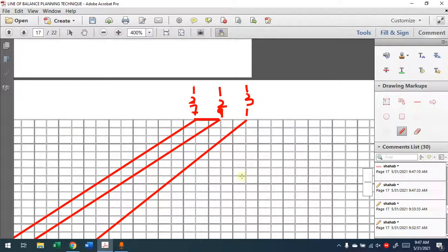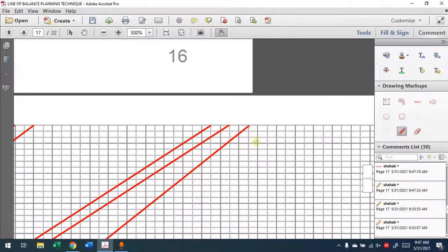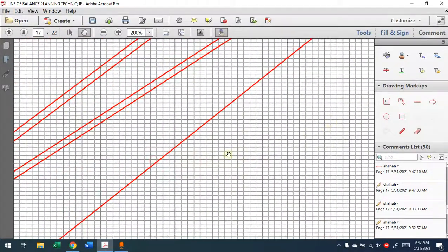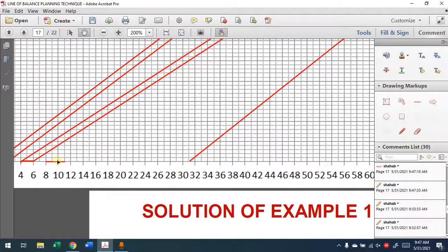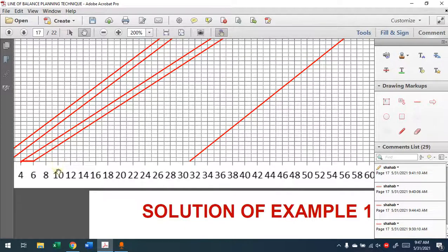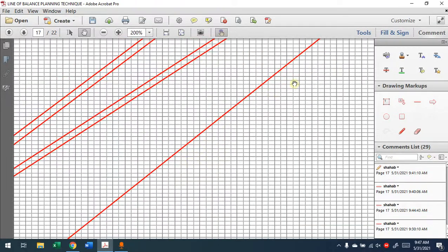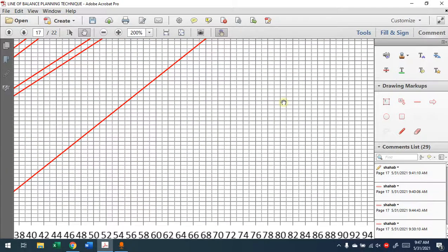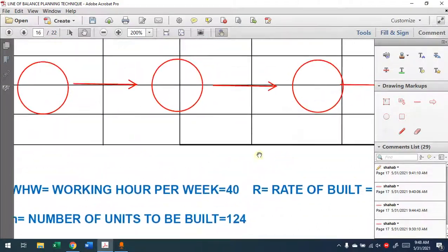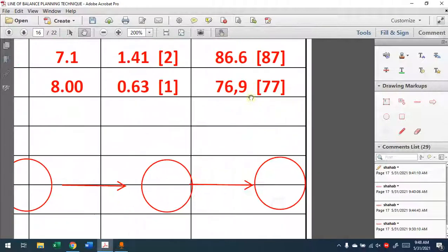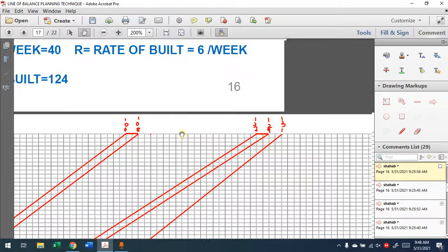In order to find the start of it, where is it? The start will not be 8. Remember, please, you cannot say, okay, I did this one and the start will be 8. No, the start will no longer be 8. So we'll delete this one here. The only thing we need is the difference between the start and the end of this line, which from the table we know is 94 days. So if the top is at 131, then 131 minus 94 gives you the bottom.